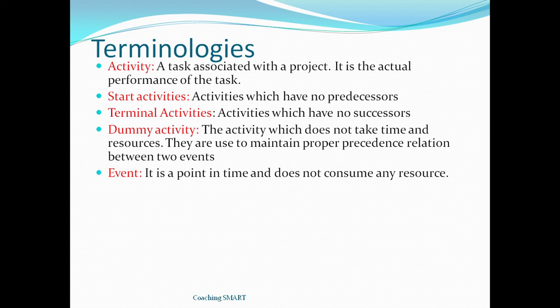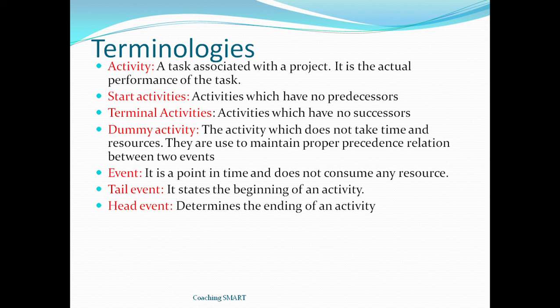Event. It is a point in time and does not consume any resource. So when you talk about event, it's normally presented in terms of nodes. So event is a point in time and does not consume any resource. So there are two things about event. We have a tail event and we have a head event. A tail event states the beginning of an activity. So a tail event is a starting point of an activity. Head event determines the ending of an activity.